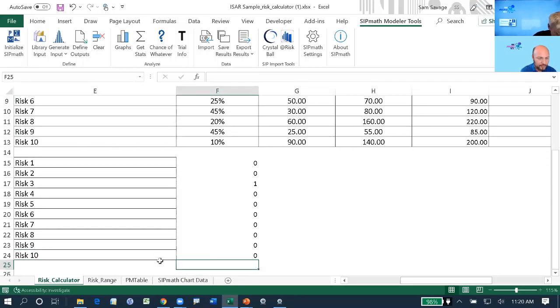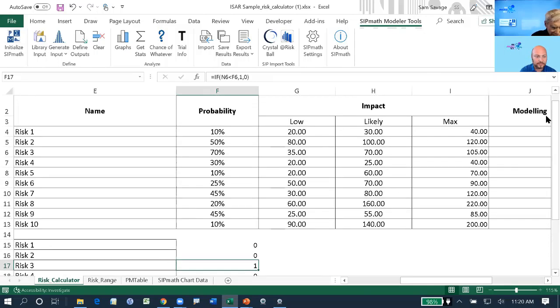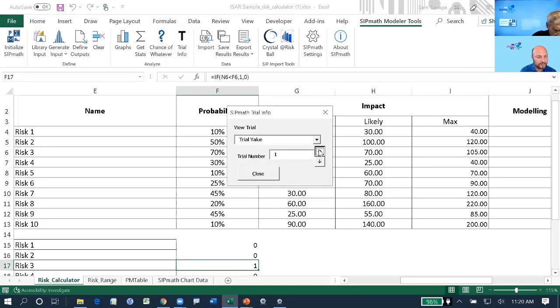Okay, so this form is very important for you to understand. It's very, very simple. I take a spinner that goes between 0 and 1. The probability that that spinner is less than 10% is 10%. Are you following this formula? Whatever percentage you put in here is the number of ones you'll get here. The simplest way to develop a Bernoulli variable. You following me? And I can always look at trial 1, trial 2.